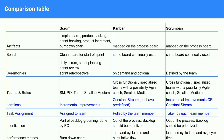The board: at the beginning and end of a sprint in Scrum, your board should be empty and you start anew. But with Kanban and Scrumban, the board is in continuous use — what you thought you'd take on at the beginning of the sprint but didn't until three sprints later is fine. With Scrum, everything should be completed with a clean slate moving on. Ceremonies: with Kanban and Scrumban, do what's good for you, but Scrum requires you to do the ceremonies in order to make the next sprint work.